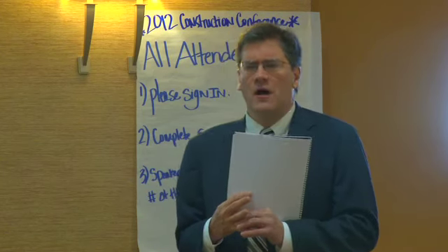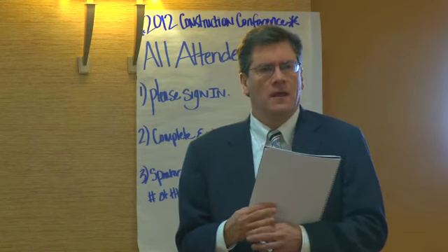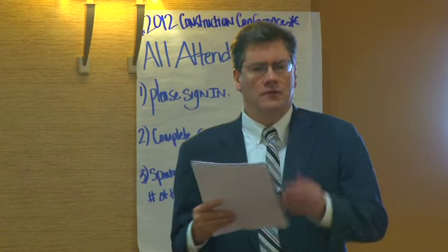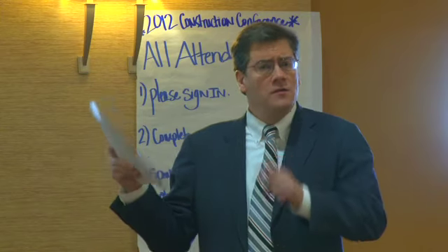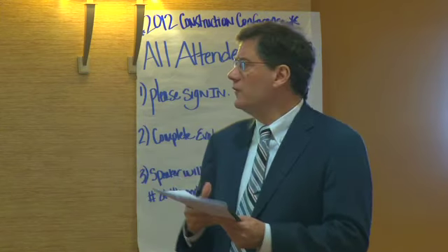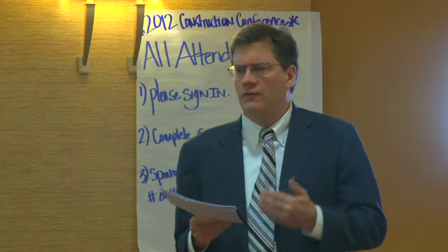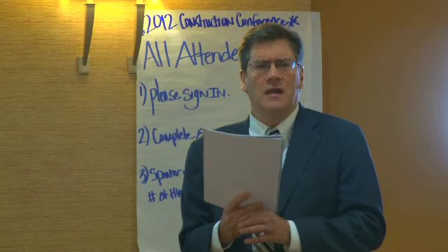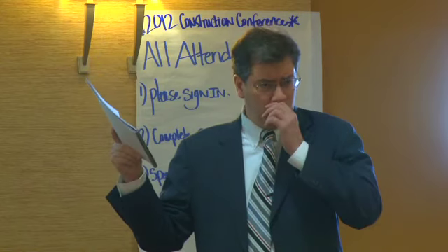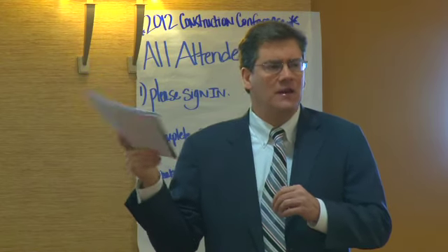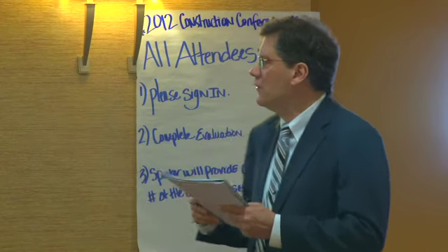So if an attorney says, don't worry about the attorney's fees, the other side's going to have to pay them, my goodness, you know. First of all, that attorney is not going to wait on these 30-day invoice cycles for you to pay, all right? Second of all, no court awards 100% of attorney's fees unless there was bad conduct on the other side. They're going to come up with a number that's somewhere between 50 and 75% of those attorney's fees. And depending upon the amount of attorney's fees, that loss of the 25 or 50% of the award can cancel out the net recovery that you're going to get out of the project itself. So you really got to think through the attorney's fees factors.